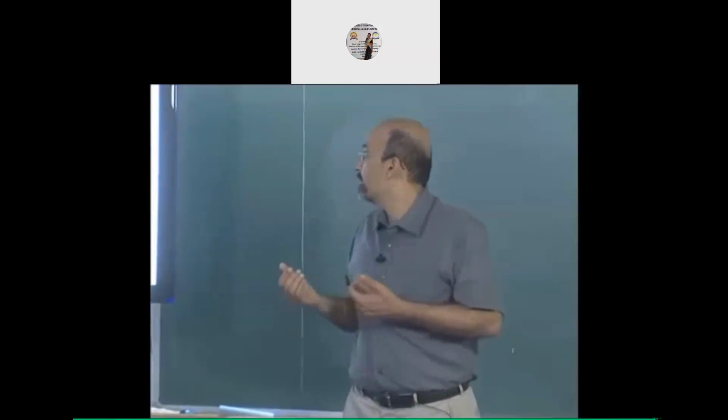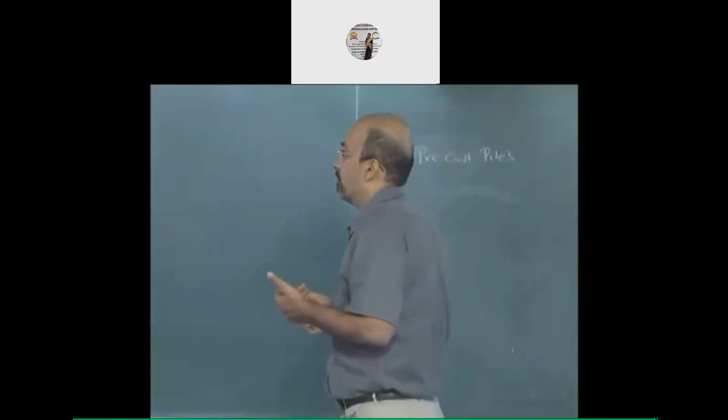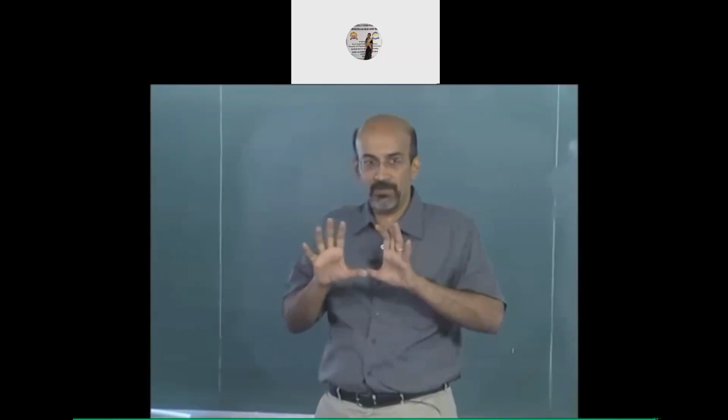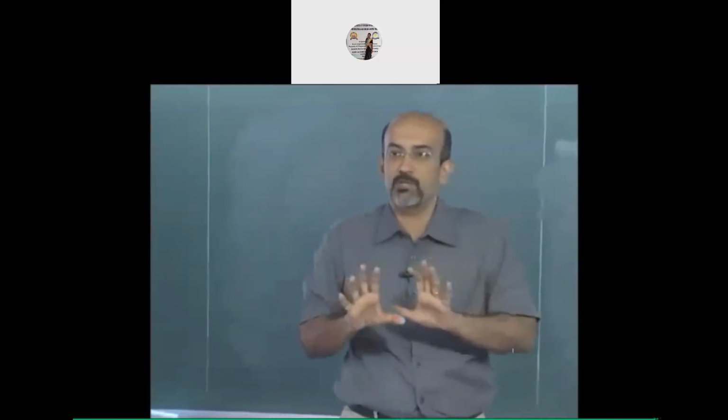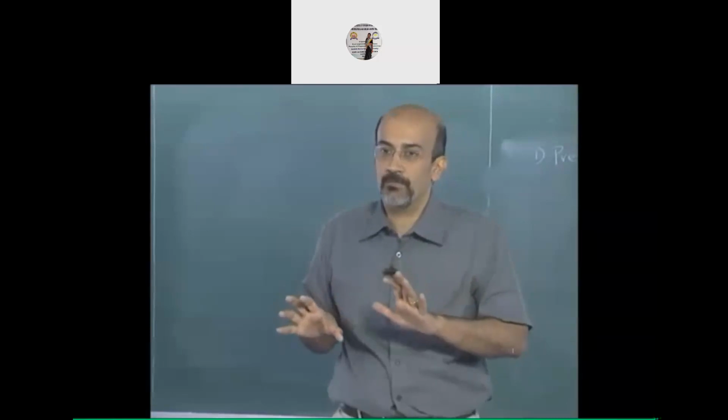Okay? The second question: what activities should we consider? Like we have said, the WBS should be comprehensive. There should be no gaps in the job logic. Logic doesn't necessarily mean sequence. It means that once I've completed all the elements of the WBS, my job should be fully complete. All activities of my job should be accounted for.